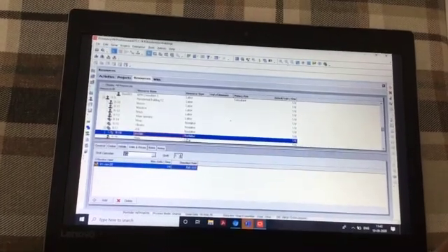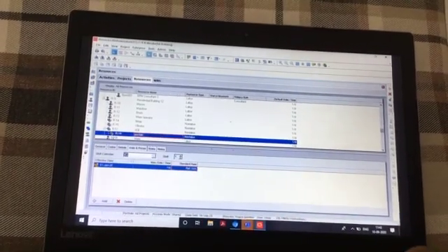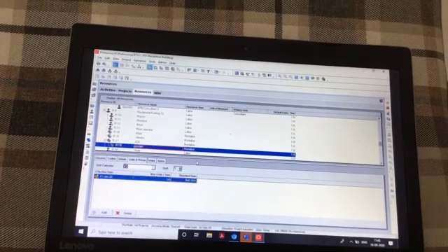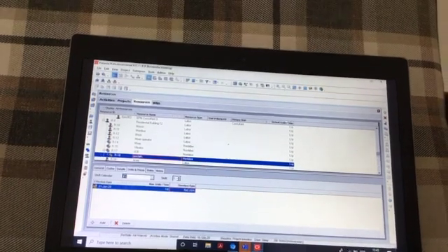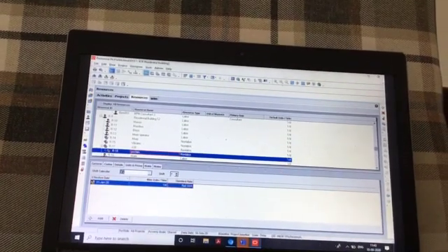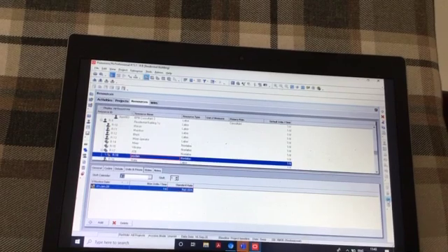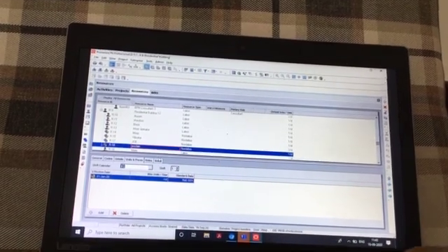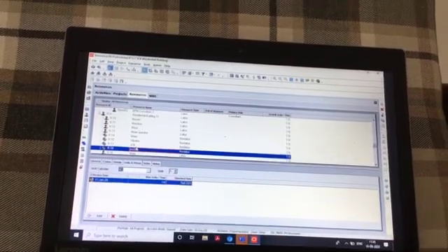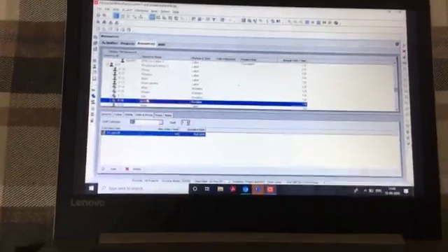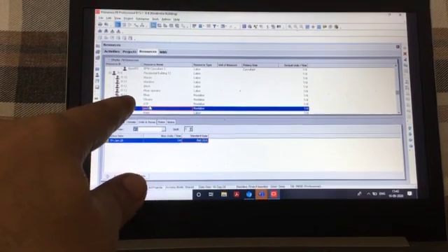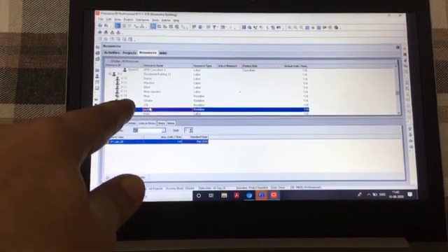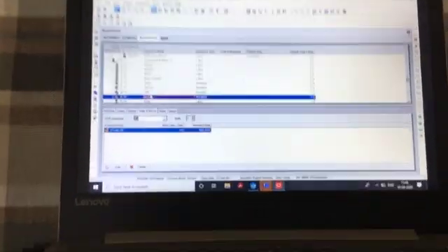As it is a non-labor resource, it has been marked as such, but we should get it out first, because it is dependent on the 17th activity. So we'll go here and press left. This makes it an independent resource. So you can see other resources also that I have created: mason, mazdoor, bishti, mixer operator, mixer, vibrator. These were all given in the course, so I created them as such.